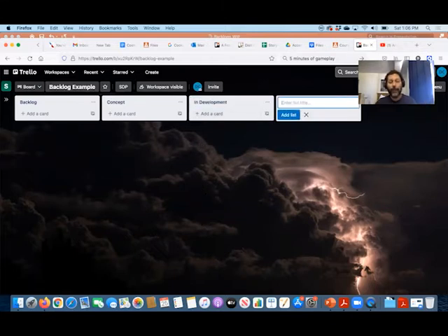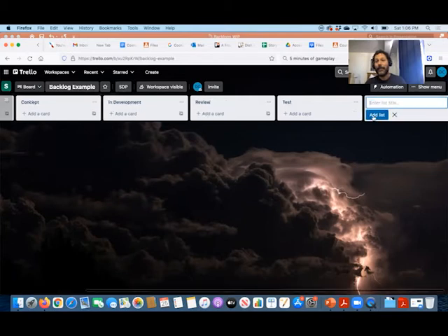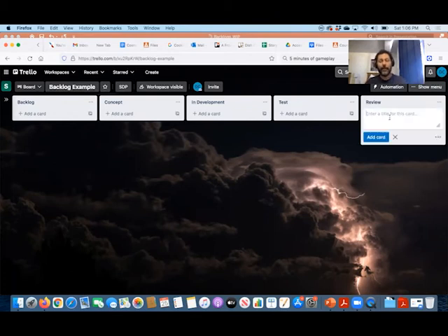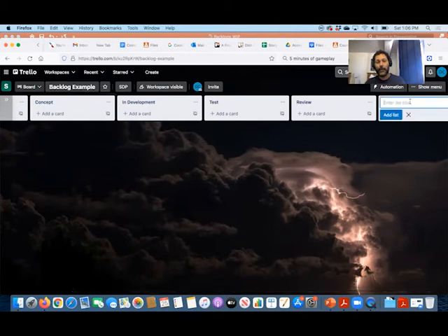I'm going to add review. Maybe it needs to be reviewed by the person who's the point person on it, like the art director, the tech director, the design director. And then we'll do testing, right? We'll add testing because we need to play test it. Maybe we need to play test it before we do the review. So here, let me move it actually to before the review. And let me add one more and we'll call it complete.